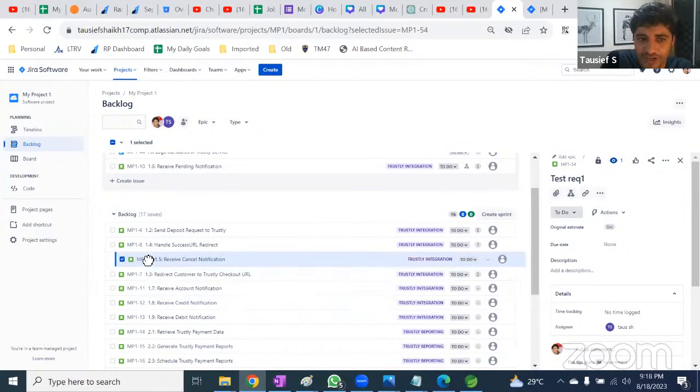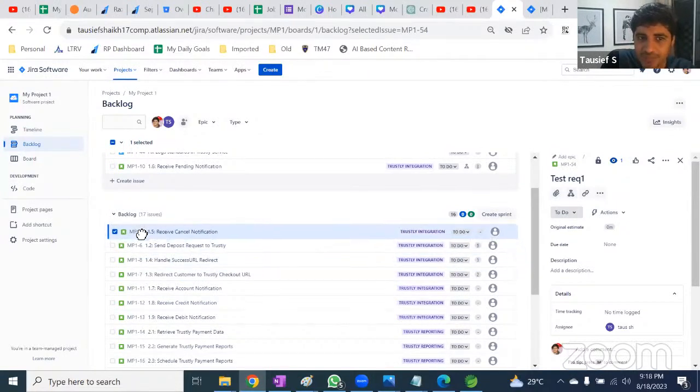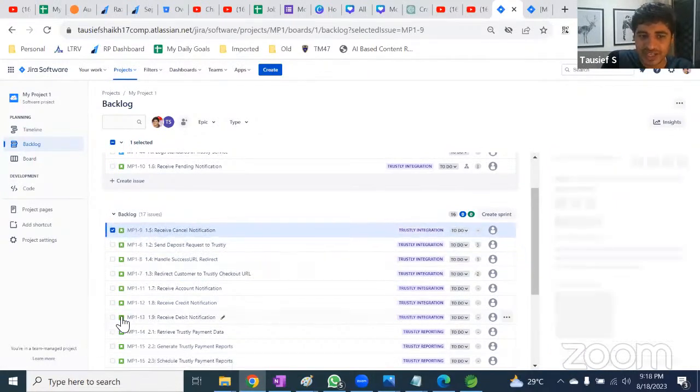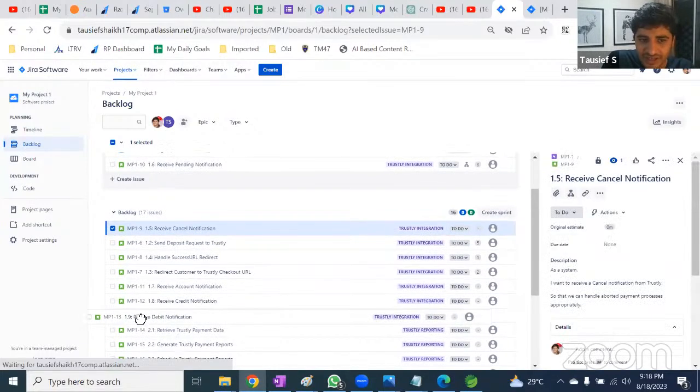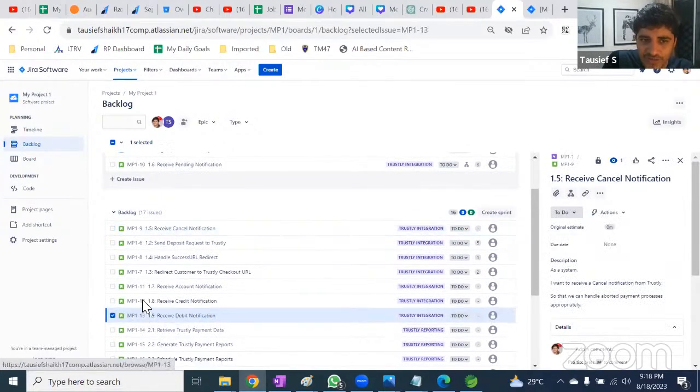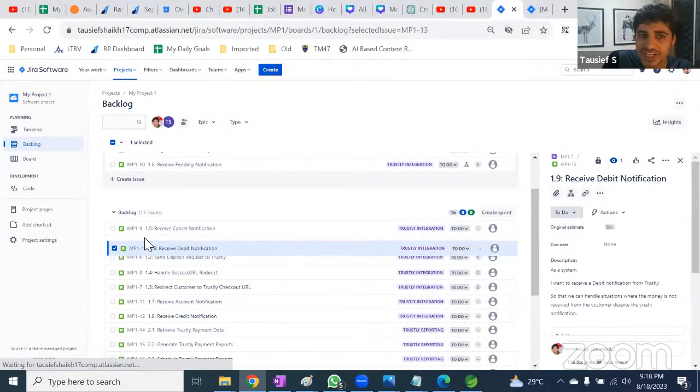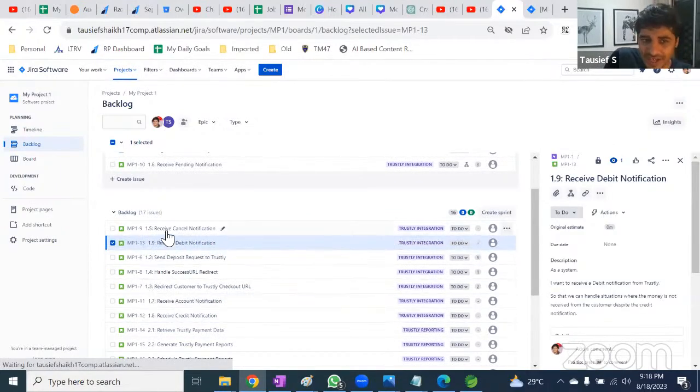It's a draggable option. This is how you can assign priority. If you feel this is more important, the product owner is going to move this up and keep it there. Then he feels the next one is important. He goes here and moves this also up and puts it in second priority. This way, he will arrange things in priority. So from the technical team's side, you need to know that if you go to the backlog, the items from the top are important for the business, and you have to estimate and develop those first. Okay? So far, this is where we are. Now let's go to the next step.